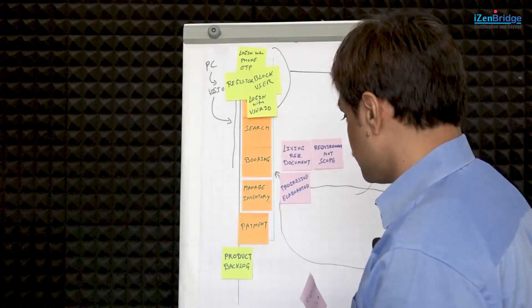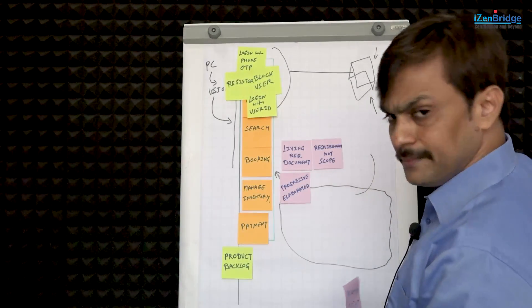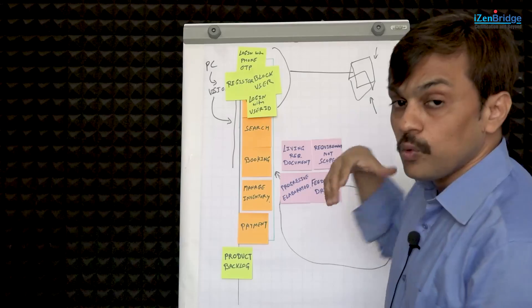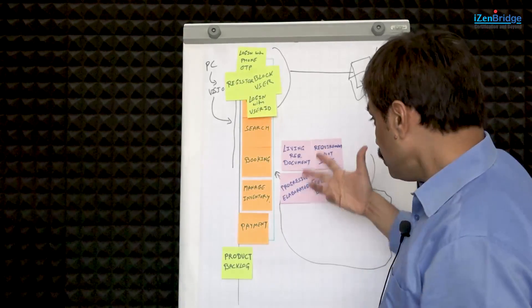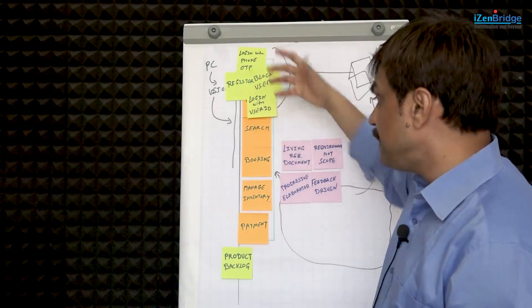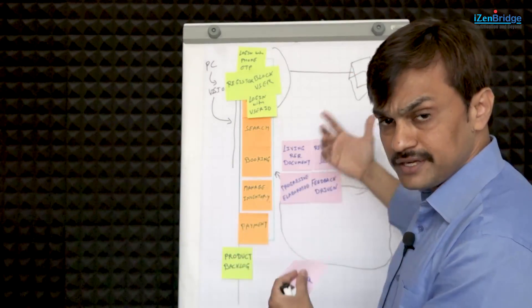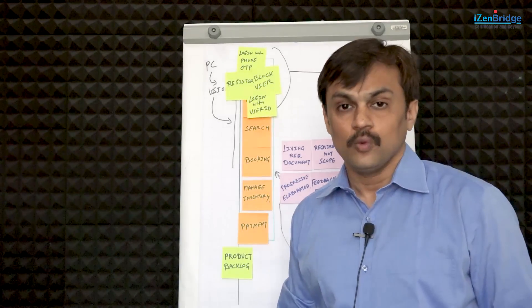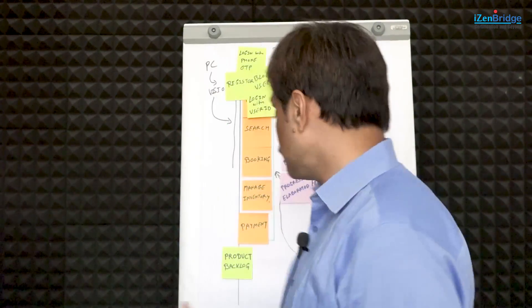There are two elements to progressive elaboration. First, we are not elaborating everything at the beginning — we want to do it gradually and learn more, then implement. Second, that elaboration should be based on what we learn from stakeholders after giving them a piece. If I don't know how they'll respond to user registration, I shouldn't create an elaborated requirement for search yet. Once I have feedback, then I can elaborate what's needed in the search space.